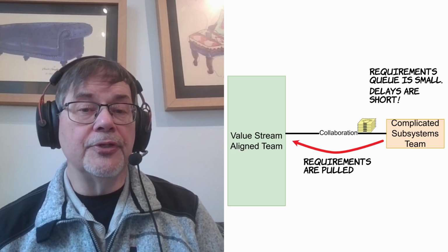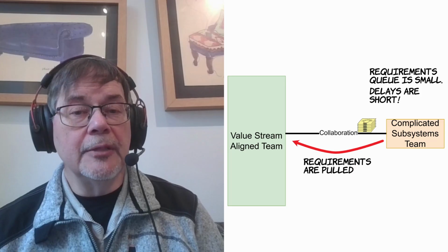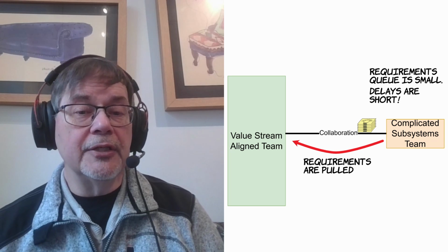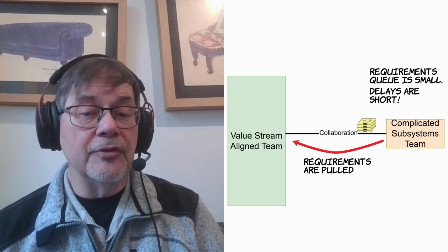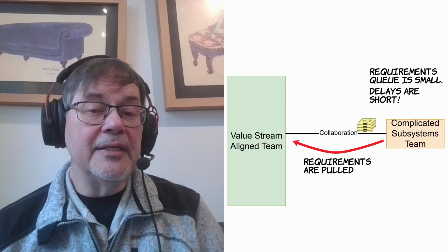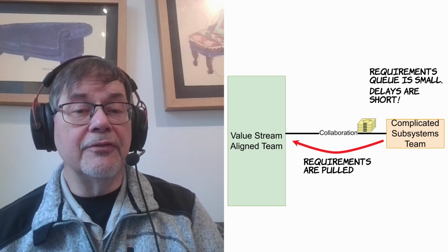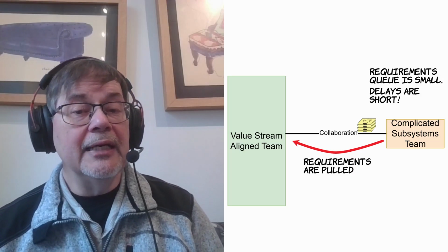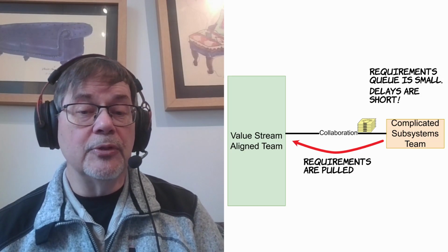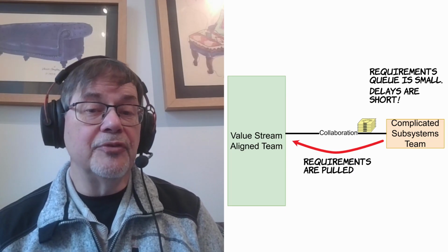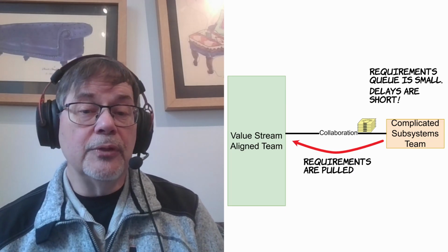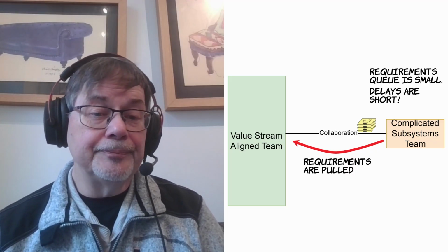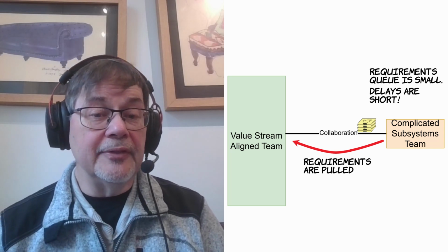This is the same team topology as before, but with a pull process. The pull process puts the developers in control of their workload and makes it possible to shrink the queues and therefore also shrink lead times and reduce cost of delay. The lack of a basic process model may be the greatest flaw in the book. If you have a high variation process like software development, it doesn't matter how well you structure teams and team communication if you do not have a mechanism for regulating flow in the work process, because you will almost inevitably overload the process and torpedo all the organizational work. So please get this one right.